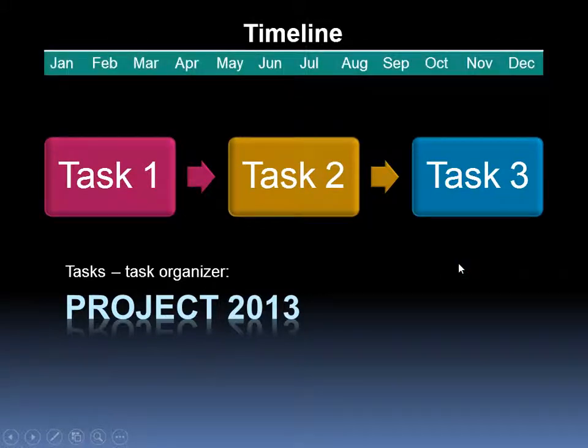These tasks are usually tracked on a timeline, where each task is allotted so much time — like hours, days, weeks, or months — to be completed. And if one task takes longer than the set time, then as a result, the entire project will be extended beyond its due date and of course be late.